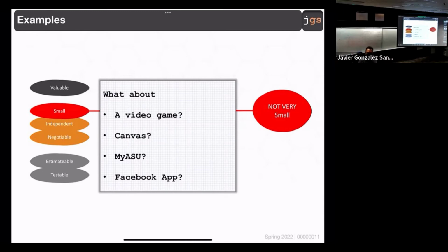So because it's not something for this couple of hours, I move to it's a requirement. And it's a requirement and maybe something that someone is going to do in 1 day, 2 days. I don't care. But I can think about it as a requirement. It's good enough to be the work of 1 person at least a couple of days. The average person. What about the maze for Pac-Man? That is going to be a second requirement, yes.